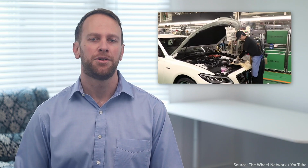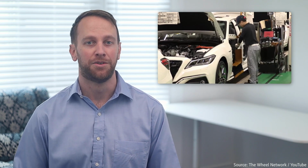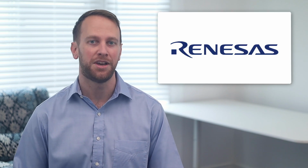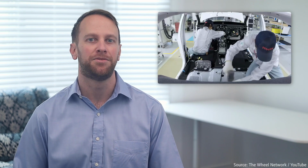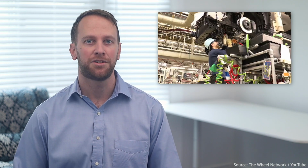Toyota had already experienced supply chain disruptions after Japan's 2011 earthquake, which caused it to confront this issue earlier than other automakers. After its suppliers were disrupted, Toyota built a database of 400,000 components linked to their suppliers. Before 2020, Toyota was able to ask its major suppliers, such as Denso or Renesas Electronics, to keep up to 50 days worth of supply on hand. By July of 2021, that increased to stockpiles with 4 months worth of supplies. Without an analysis of its current reality and constraints back in 2011, it wouldn't have been ready for the challenges of 2020.